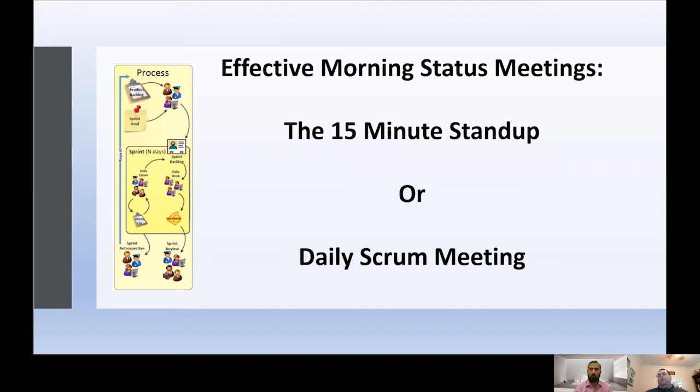During this meeting, you focus on what was promised, what was delivered, what is promised for the upcoming day, and what is blocking progress. Anything that requires discussion should be scheduled for a later meeting with just those parties. This meeting should be very, very crisp.